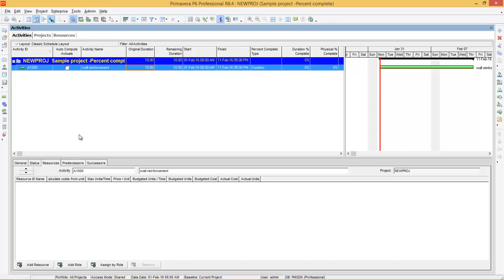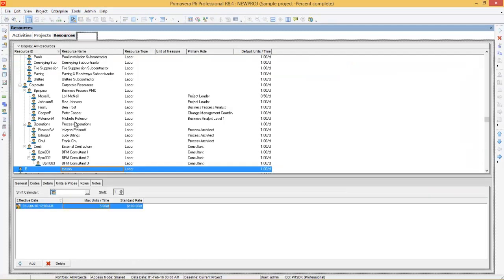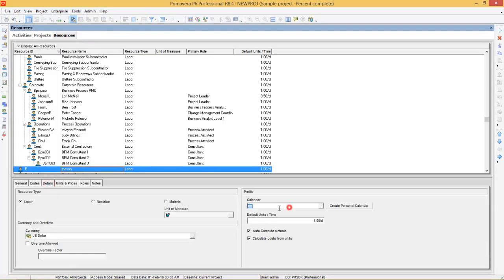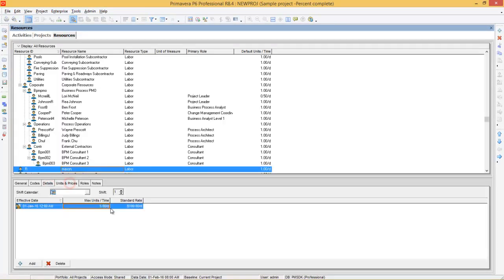Now we will assign a resource. Before that you have to create the resource — go to the resources tab. Here I have already created a resource which is Mason, that follows the project calendar. We have 5 Masons that can work per day, and the rate of each Mason is $100 per day.